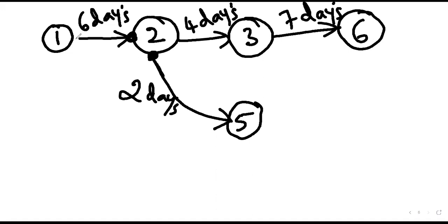So if you are starting the setting up of the office on 1st of May, then on 6th of May you may have finished setting up the office. And on the 7th day, you start the next activity, that is the hiring activity. And on the same 7th day, you're starting the advertising campaign also. Correct? So selecting the advertising agencies. This is nothing but drawing the network diagram. What is the next? Plan advertising companies.